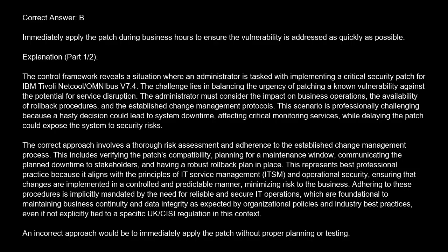This scenario is professionally challenging because a hasty decision could lead to system downtime, affecting critical monitoring services, while delaying the patch could expose the system to security risks. The correct approach involves a thorough risk assessment and adherence to the established change management process. This includes verifying the patch's compatibility, planning for a maintenance window, communicating the planned downtime to stakeholders, and having a robust rollback plan in place.